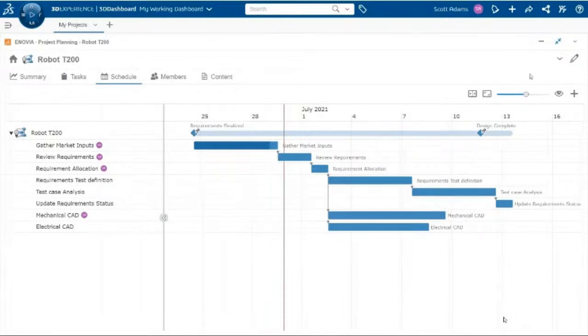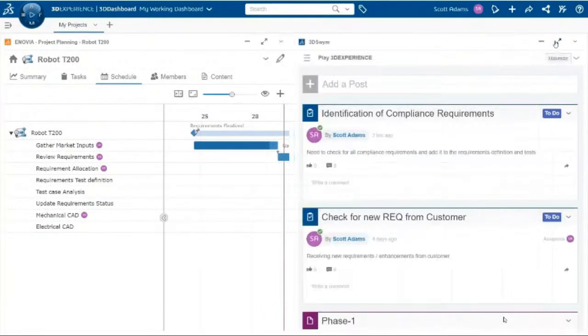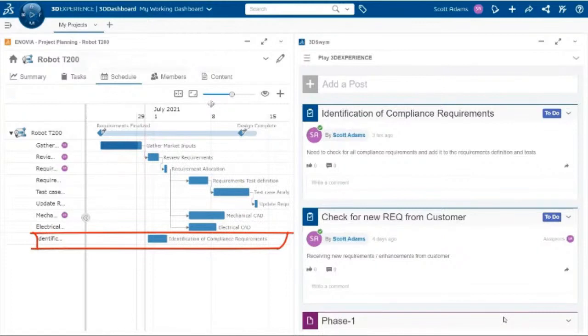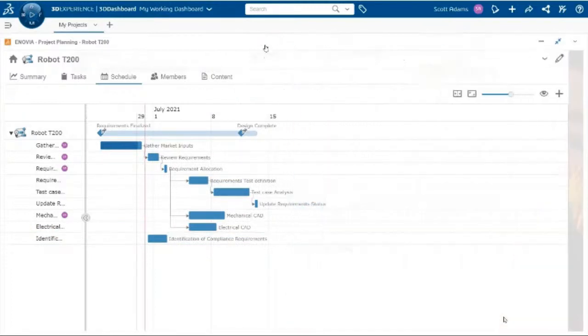Now, this FD We Do task from the community can be added into a selected project easily by selecting the We Do task, and dragging and dropping it from the community onto the project root node. When the We Do is added to the project, it becomes a project task which you can schedule and work on.